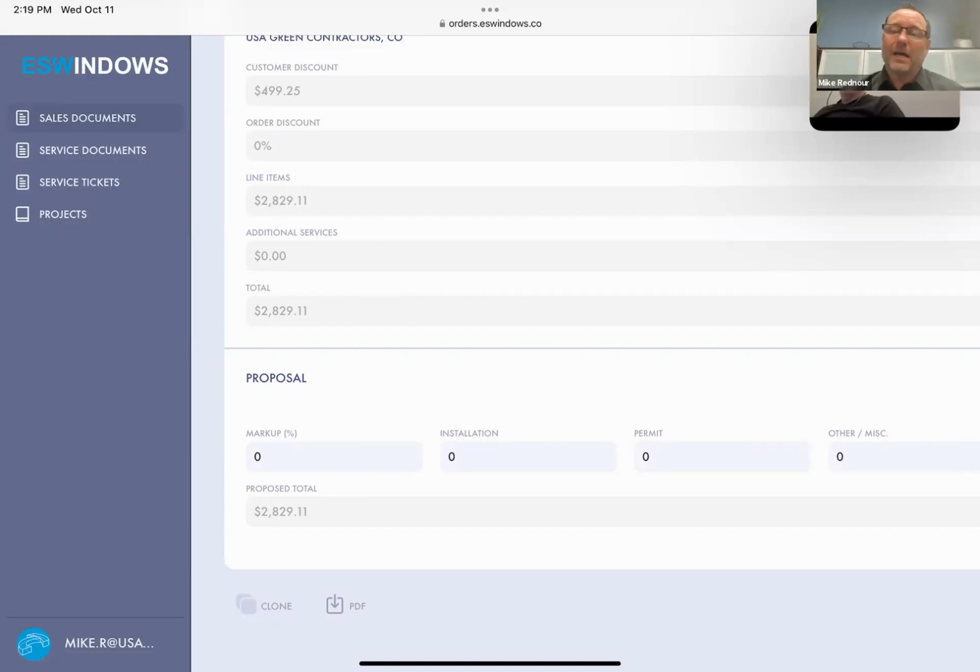He's got a $180,000, or is it $150,000, job that he's getting ready to close on a church, and he's thinking he's going to do a $1,000 permit. No, that's a $5,600 permit. If he would have put his permit in there at $650, he's upside down $5,000.